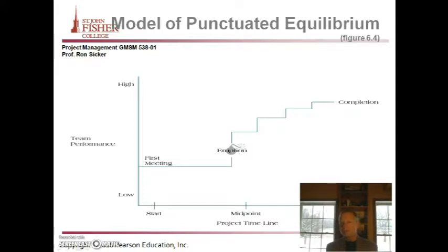And then they go through maybe a little bit more storming, and then more productivity. And throughout the whole punctuated equilibrium model, you'll see where people are performing, and that's when the line's going up, and when they're going back to storming a little bit, and then when they're performing and going back to storming a little bit. So they kind of move in and out of those stages, but the longest stage for storming is from the first meeting to really when they start being productive.